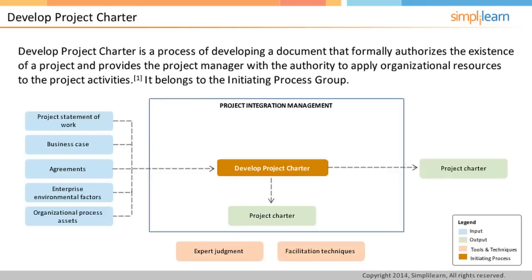It is important to point out that a project charter is not a project management plan. The detailed risk, schedule, cost analysis, etc. is part of the project management plan and should be done during the project planning phase when there is more detail available. The charter should be sufficiently high level to accommodate the minor changes that might arise in the project.